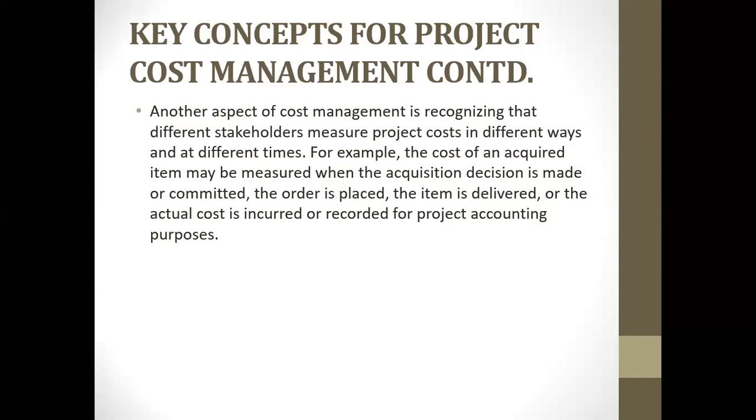Some project stakeholders, as soon as you agree on a price for a particular project, are willing to pay you immediately because they believe in the project plan they have, and based on the kind of person they have as a project manager, they don't have issue. Then you have other project stakeholders that will tell you, okay, what is the basic financial requirement that you need? So maybe out of 120 million, they'll first of all give you 1 million. Okay, so they measure the project progress according to the volume of money they've given. Then you have those that you will tell, okay, this project is 120 million, but we anticipate contingencies that may cost us 150 million. They will give you 150 million and tell you, okay, if the contingencies come up, take care of them. If they don't come up, then let's find a way to reconcile.